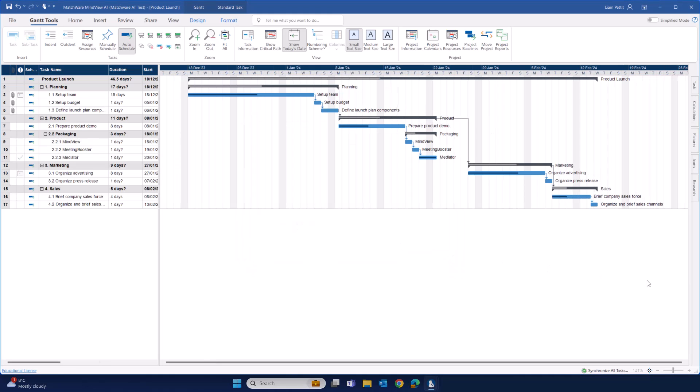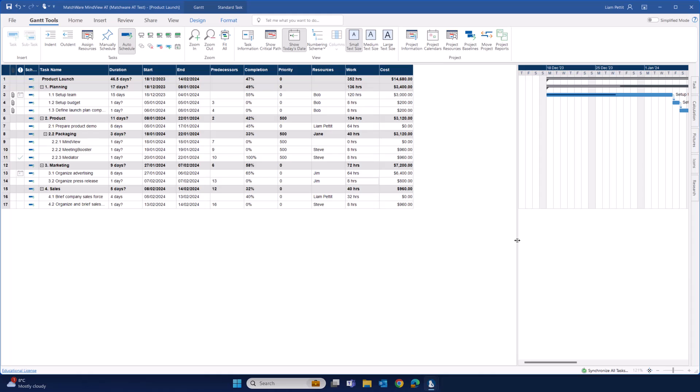So again, fast forwarding a little bit. In this example, I've updated the completion of some of my tasks. Let's visualize that against our baseline. There's a few places where we can visualize the deviation between the baseline and the current status of our project. Within the outline, you can add any baseline data as a custom column. Simply right click and add the relevant baseline data.